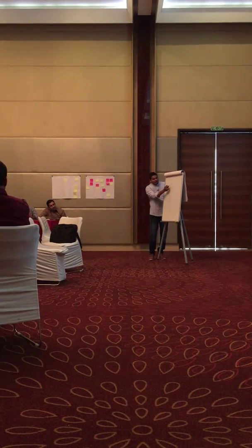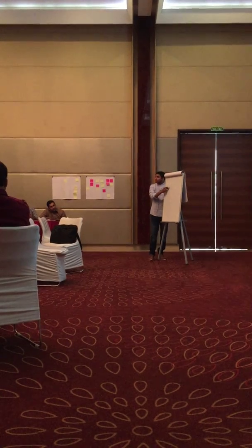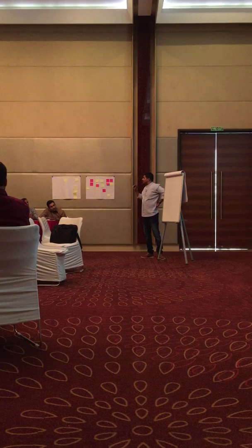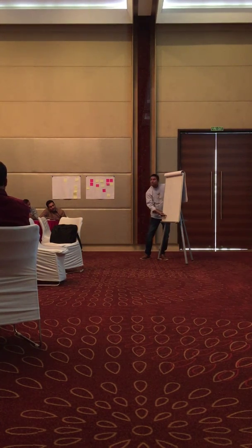So first you may pick up this story because it is the highest priority story with respect to business value. Once the development team spends 2 to 3 days, they say in the daily scrum, okay, good news, we completed the first story. Somebody like the scrum master asks, okay, did you do this? Yes. Then you can say done. This is the first done. Similarly, you do all these things.